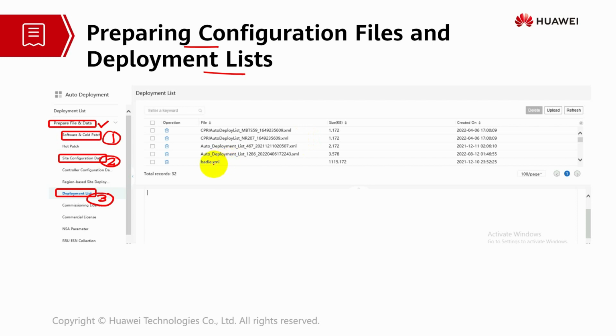At the same time, we are also integrating the XML script. We are matching the XML script and the software version exactly to what is being updated or upgraded at the site level. So we are matching the preparation of the remote commissioning to be exactly the same as your actual site, so that later on when you want to upgrade, there is no dispute. Basically, these are the preparations that need to be done before the commissioning is executed.